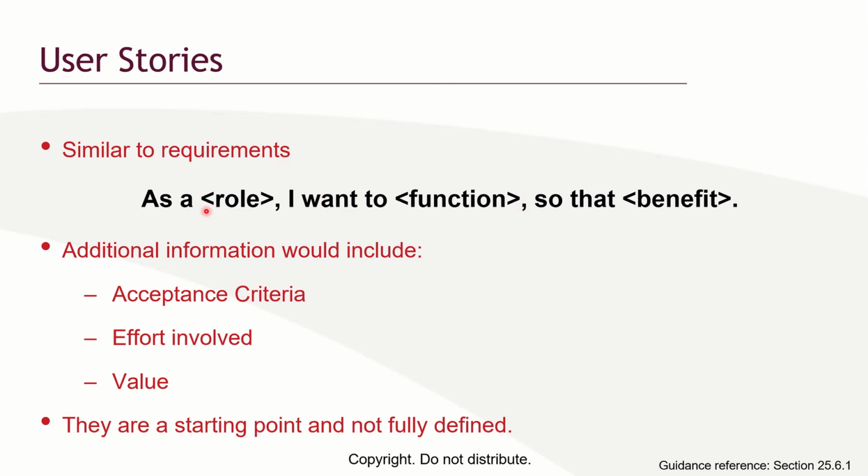How do we create a user story? These are the keywords: as the role of the user. For example, as an HR manager, I want to, what is the function you want to do? I want to manage all my staff leave.